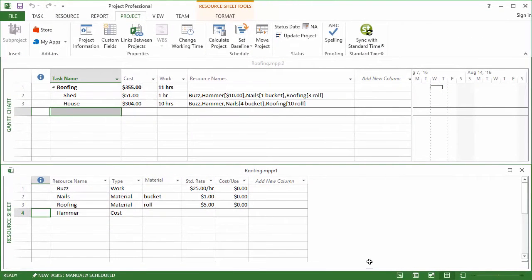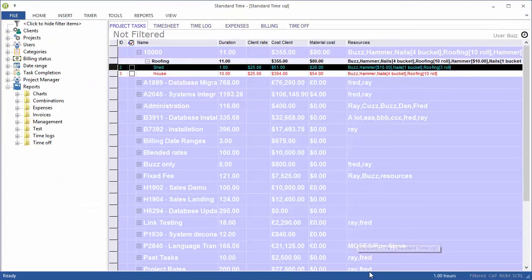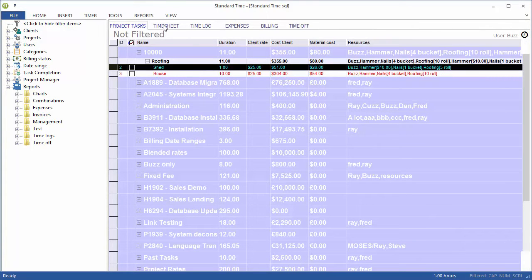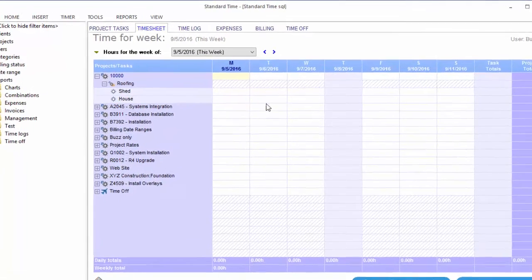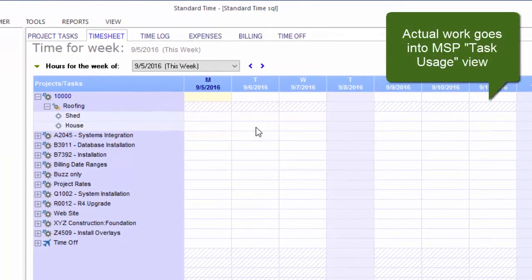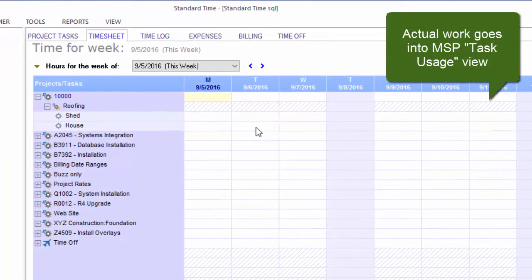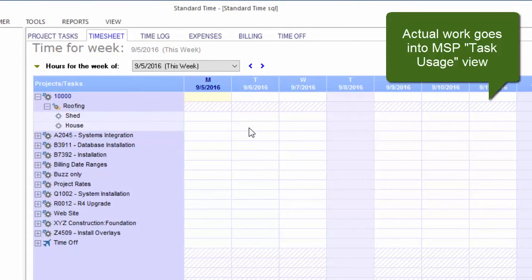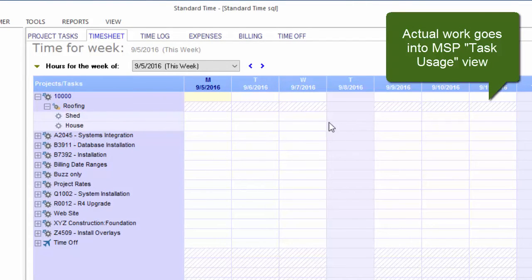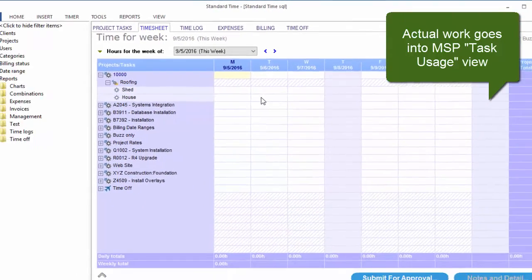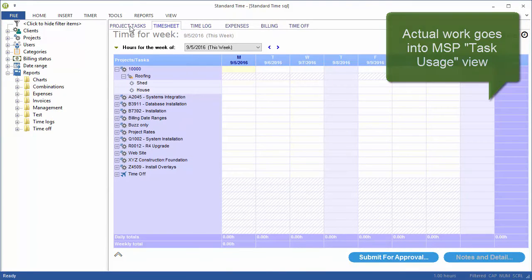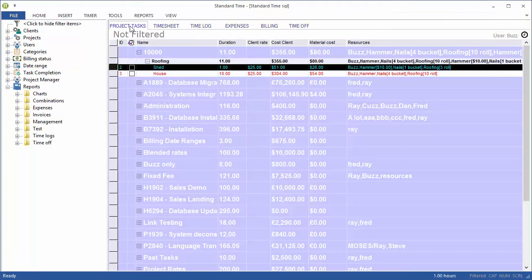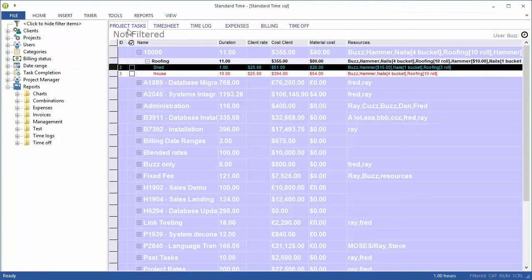One more example. Switch back to Standard Time. I should say that the actual work will also come up from the timesheet into Microsoft Project as well. This is not just for costs. Buzz presumably is going to be putting in his hours into Standard Time into the timesheet and those actual hours will be going up into Microsoft Project as well. But for the sake of this video, we're just talking about costs.